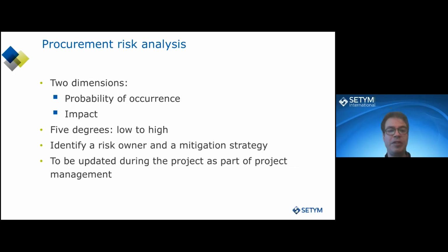It's an assessment done by the project. And you do this for every risk. And for every risk, you identify a risk owner and a mitigation strategy. And it's to be updated during the project as part of project management. A risk owner is the person who will be managing the risk. If no one is managing something, well, it's not handled by the project. And a mitigation strategy is the solution you have so this problem doesn't affect you.